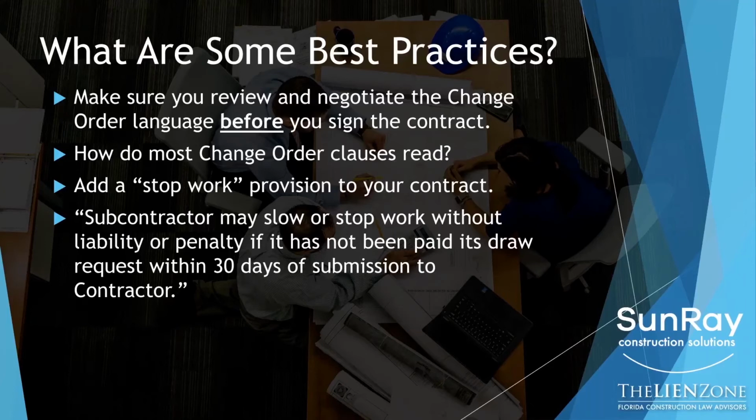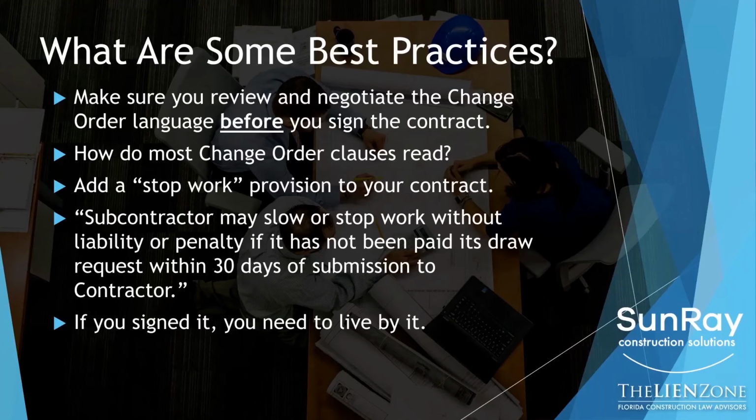Maybe 30 days is, they negotiate that to 90 days. As long as you have the right to stop working if you're not getting paid, that's the goal. That's what you're looking to add into your contract. Because I'm here to tell you, if an owner hands you a contract or a general contractor hands you a contract, much more likely than not, you will not have the right to stop working. And know that if you signed it, you need to live by it. So it's hard to complain about what's happening on a job if at the end of the day, while it may be unfair, it still may be within the confines of the contract that you signed.